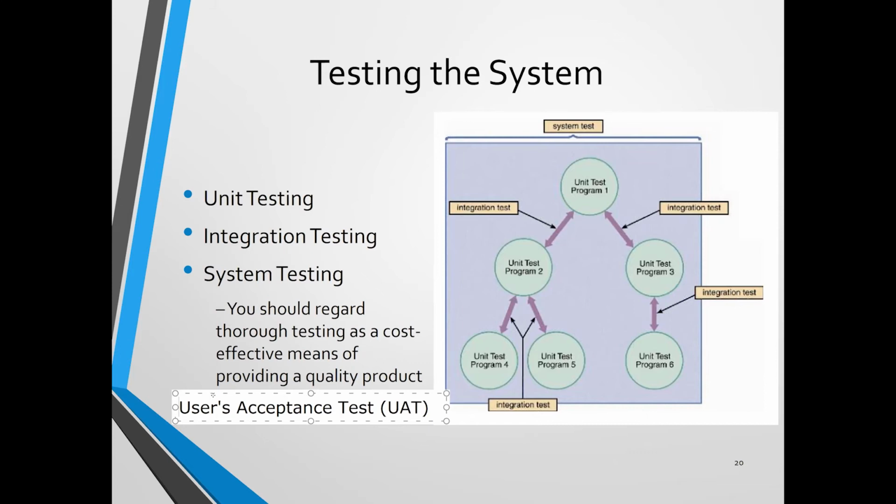And if you say that you have 10 modules, how can a user know where to go? Normally, user acceptance test for a big system, we don't use just one person. If we say that we have 10 modules that are used by 3 departments in the company, that means you need to have the users from those 3 departments to test on the UAT. And in each department, you may have 3 or 4 users to test.